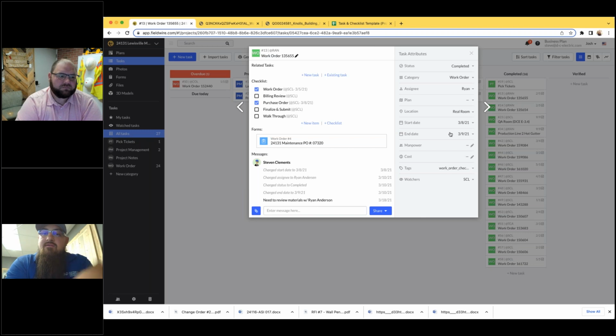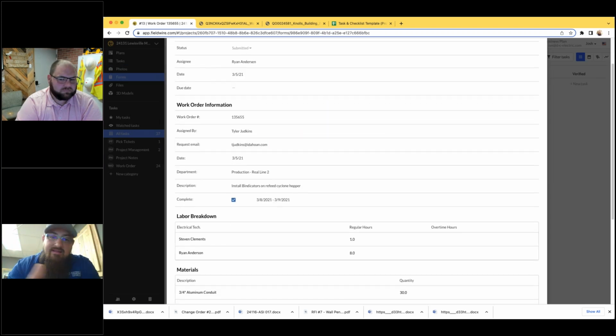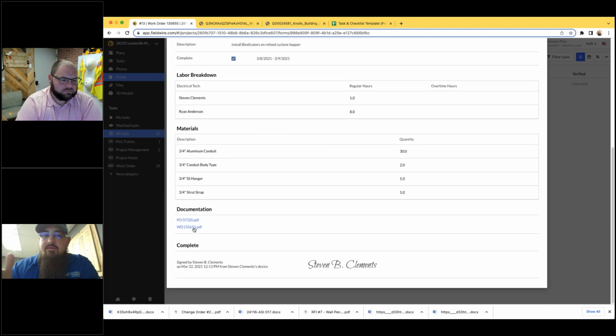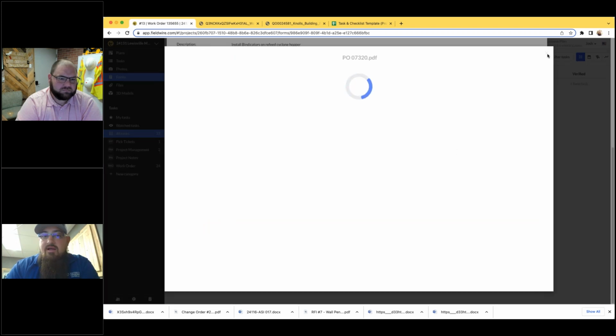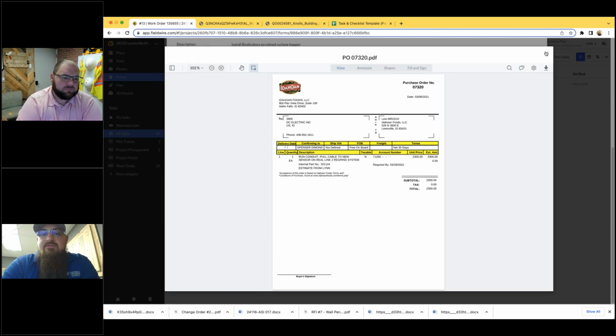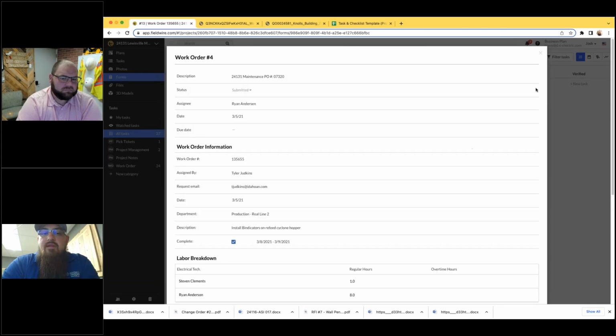So we made, again, custom forms. We took their work order form and created that inside of Fieldwire, so that all we had to do at the end was send them this, and the billing was immediately approved. They could see everything as it was done. So we took the PO that they gave us, the work order that they gave us, and attached it right in, so that all the documentation was in one place, and nobody had to jump around and go back and find things. It was just easy to maintain.